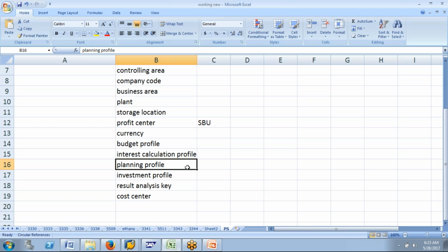If you are planning by using these elements, then we call this planning. All these are determined by your planning profile. So the planned value should not be more than the budget value. Budget is total level, annual level, yearly. Planning is periodic, by using cost elements, at object level. Object level means your object may be an internal order, may be a project system.